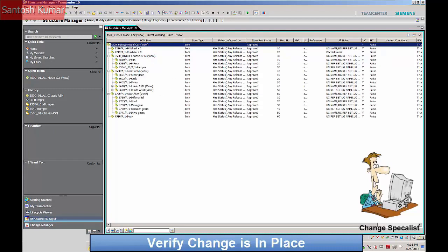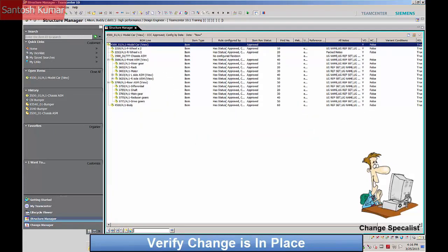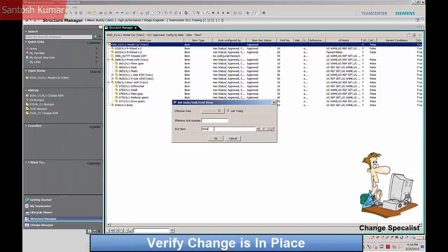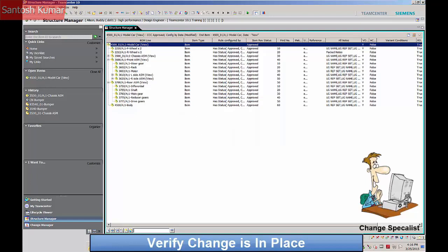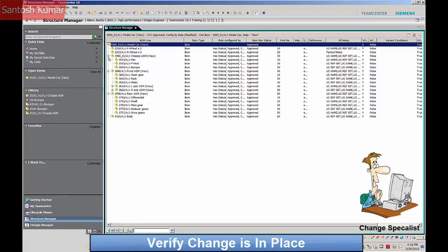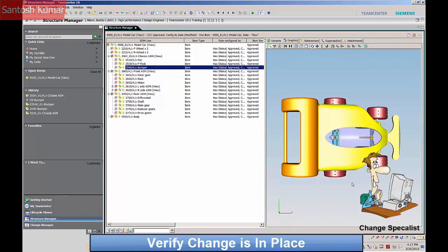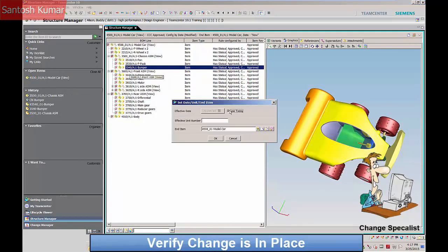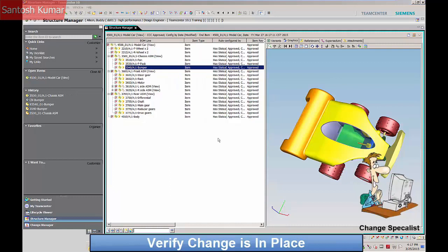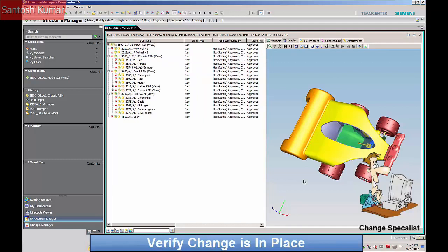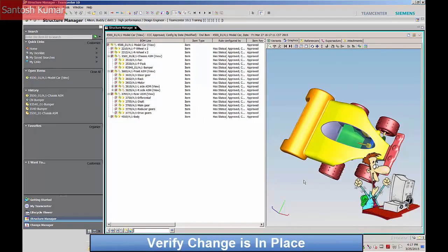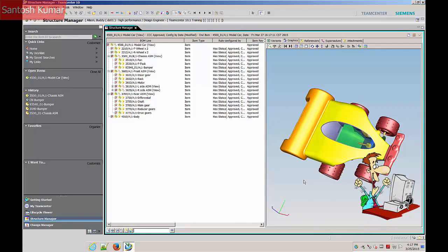The revision rule is set for approved parts configured by today's date. The effectivity date is then changed to a date after the change should take place, and the bumper changes to revision B. This change process is now complete. This was an example of a change process developed for the Classic Car Company. Teamcenter allows system customization to reflect your current or future change processes.